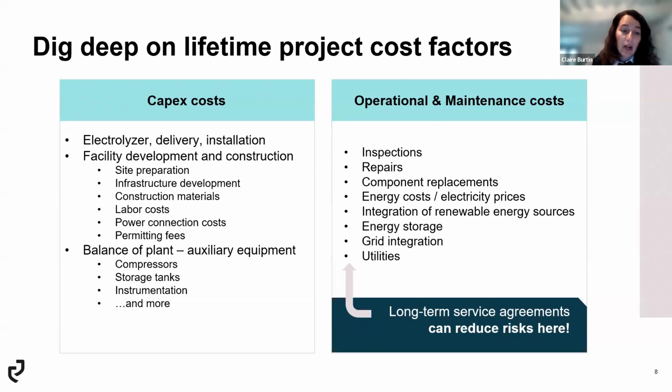And just before I go further, I just want to add a comment on that. These costs are going to be very much linked to the design of your project. So for example, if your project is close to an electric substation, in a region where power connection costs are low, you don't need to add another line to connect the substation to your project, then your power connection costs are going to be lower than if you're in a remote place where you need to add a substation, you need to add a line dedicated to your project to connect it to power.